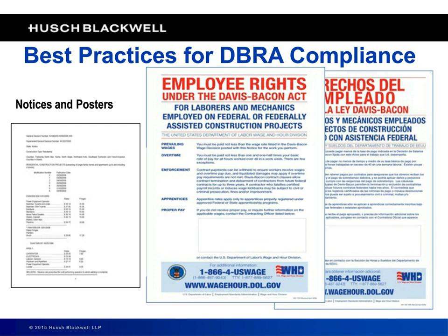Second thing you got to post is the wage determination itself. You know what that looks like. It's that report that you get from DOL that runs through all the classifications of workers and establishes hourly rates for each and every class, and it establishes the fringes and vacation pay and all those wonderful things that folks that work on a scale job are entitled to.